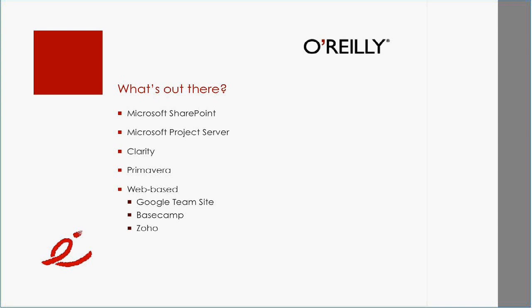Things like you have a PMO, you have a standardized way on how you plan, execute, and close your project, you have a resource management strategy. So it requires that you're very, very mature already in your PM process, even before we can roll out Project Server.